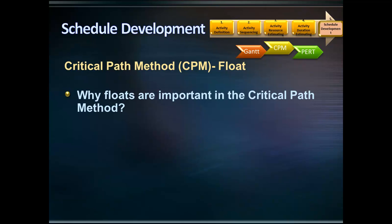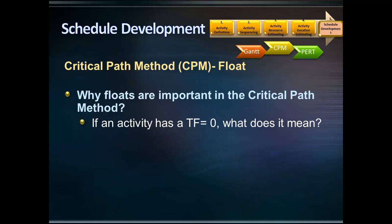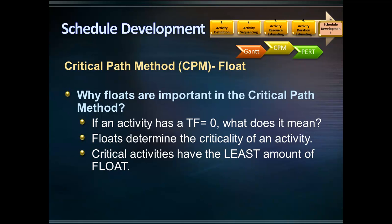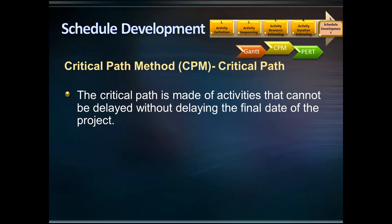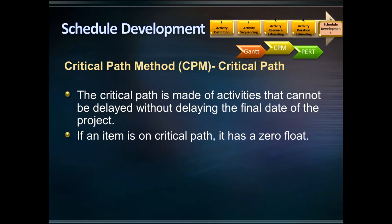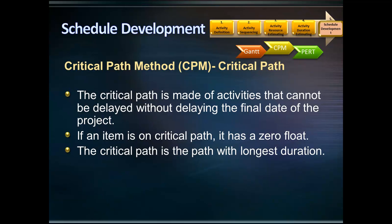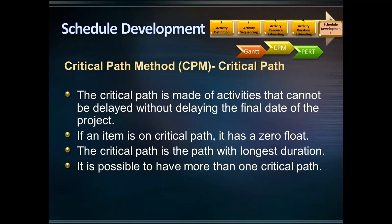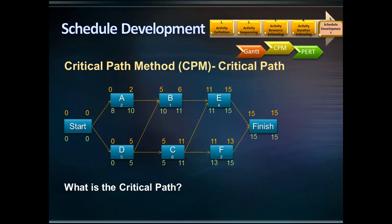Why are floats important in the critical path method? If an activity has a total float of zero, it means there is no room for delay in that activity. If it is delayed or extended, the overall project completion date will be extended — that activity is a critical activity. Floats determine the criticality of an activity; critical activities have the least amount of float, and floats determine the critical path. The critical path is the path of activities that cannot be delayed without delaying the final date of the project. When an item is on the critical path, it has zero float, and the critical path is the path with the longest duration. It is possible to have more than one critical path.